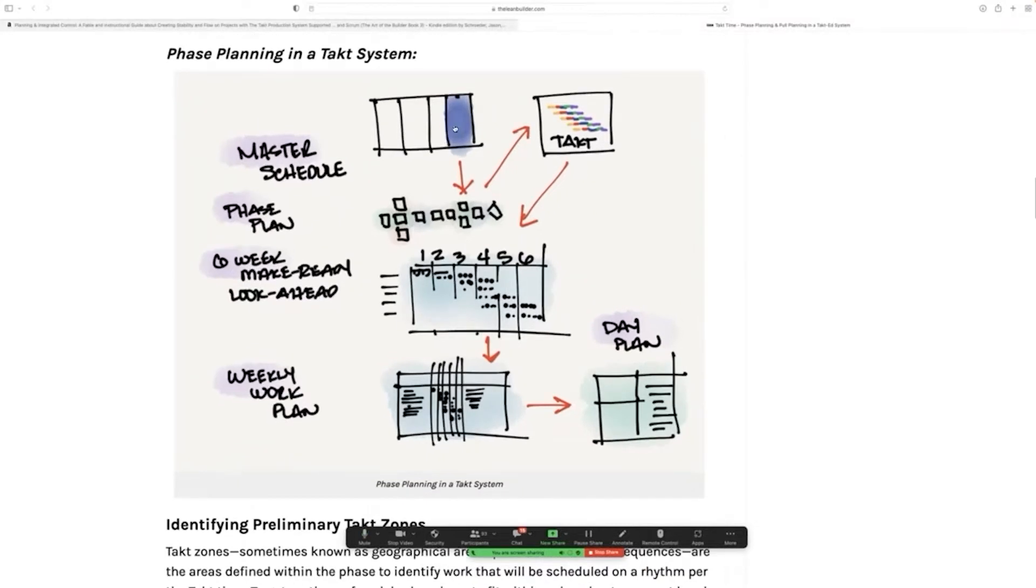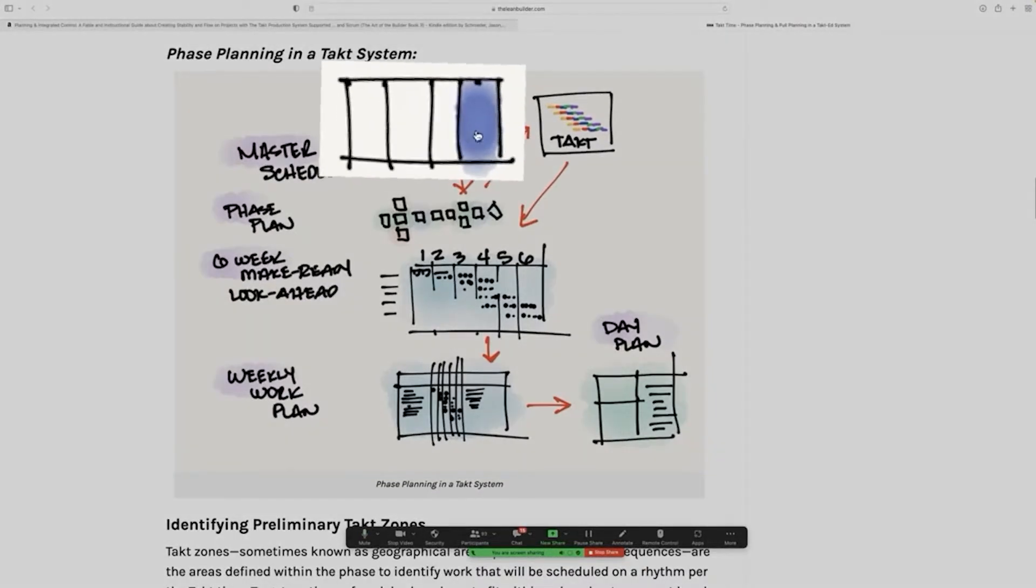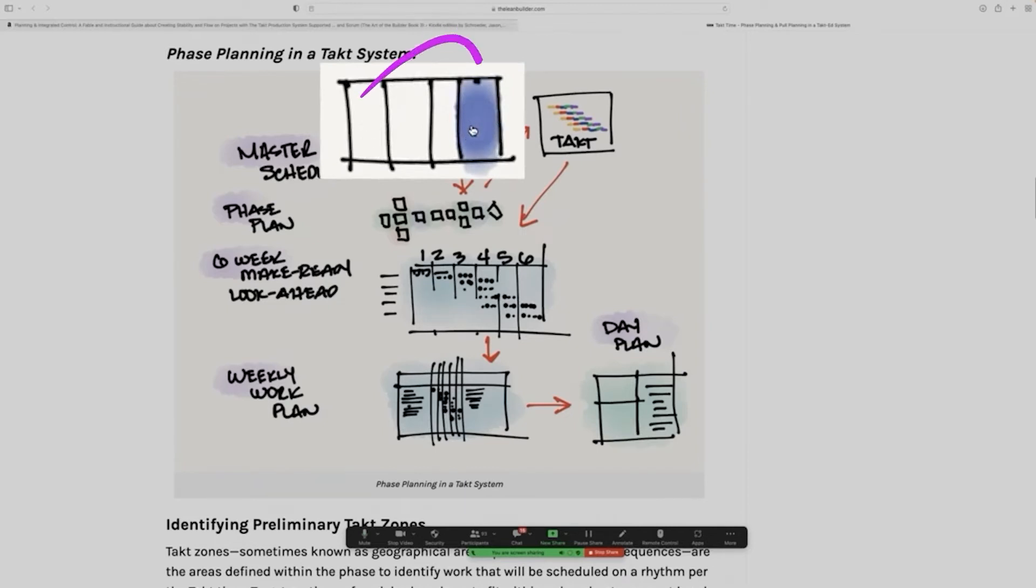So if you look at this sketch, the first thing that you do up here at the top is you break out your building into zones. And so I've highlighted this little blue area. This is our first tact zone.